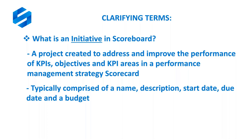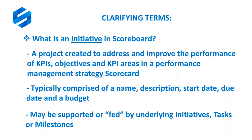One thing that distinguishes an initiative from other scorecard items like KPIs and objectives is the idea of a start date and a due date. With KPIs and objectives you're monitoring performance forever in perpetuity, whereas an initiative is intended to be more short-term — a project with a defined start and end point, even if it can last for years.